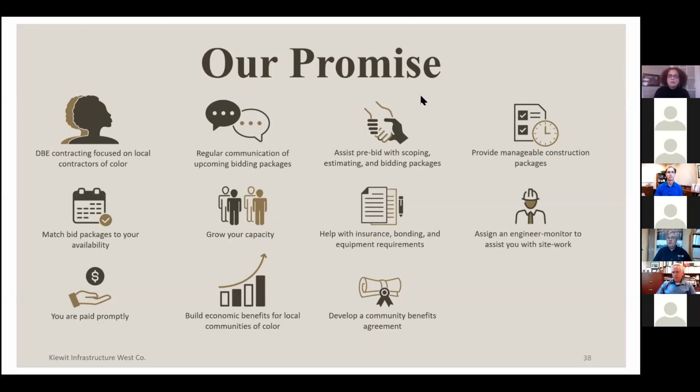I'll communicate with you regularly and notify you in advance of upcoming bidding packages so you can prepare and plan your bids. The project team and I will assist you pre-bid with scoping, estimating, and bidding the packages. I will break up the construction work into manageable packages that best suit this DBE community. And I'll be working with each of you to figure out how you want to grow your business and identify new scopes of construction work on how to grow your own capacity.